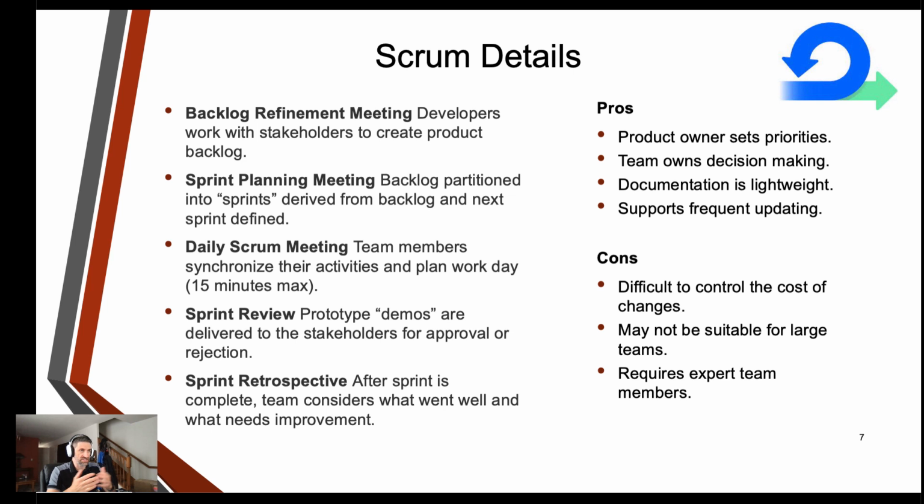So the team, including the product owner and developers, determines the scope of the work for the upcoming sprint. They select user stories from the product backlog, define acceptance criteria, estimate effort, and create the sprint backlog. The goal is to establish a clear plan for the next sprint and define the work that will be accomplished. This is the meeting that you will be expected to have every week. You will be given a template on Jira on what to fill out about it, and more information about that is forthcoming.